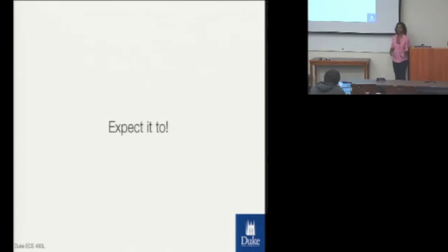If someone suddenly departs on the team, and you're like, oh, what are we going to do now? Then it's probably going to be a little bit of a scramble to figure out, okay, how do we take on some of their tasks? We had a designer at BusyBee leave abruptly, but actually what we decided was instead of hiring a new designer, we would just use some off-the-shelf components. So we found something called Twitter Bootstrap, which let us just use a bunch of UI elements to build our second product. And then we didn't really need a designer for a good 6 to 8 months. So there are things that you can do even if people leave, and it doesn't have to be like, oh, it's the end of the world.